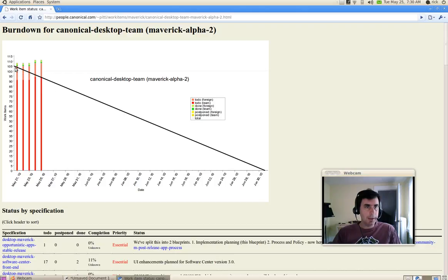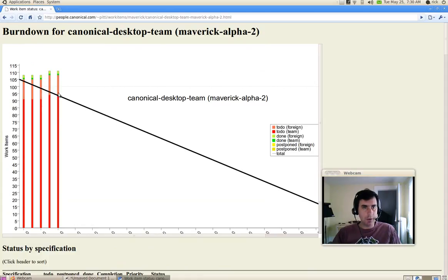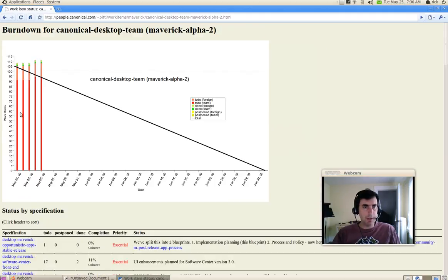And this black line here is called the trend line. You want the red part to be under the trend line because the red is undone work items. We're tracking against time. So if we're under the trend line, it means that we're working fast enough to meet our commitments in that release.